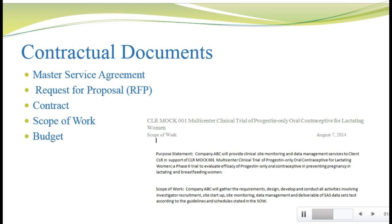What's a request for proposal? Essentially, the sponsor provides a description of the work they'd like done, and a CRO or vendor responds with a proposal for doing that work. You'll also hear this called an RFP or RFI — request for information. I've included a link to an RFP from NIDA; scan it to get a feel for what an RFP looks like. The contract outlines the agreement to perform the work and typically includes a scope of work document detailing who does what, when it has to happen, and what it's going to cost. The scope of work includes a section providing details on what tasks need to be performed and when. The image on this screen is from the scope of work document we'll be using for our mock trial.